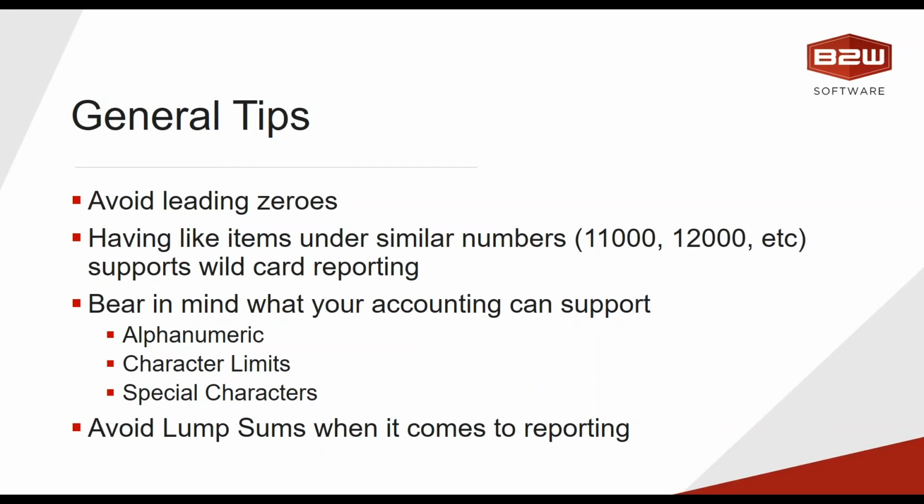When you start to assign those job cost IDs a unit of measure, it usually helps to avoid lump sums for an account level. It makes it easier for you as a company to compare how things have gone if you can have a consistent unit of measure as a point of reference. Our average cost per square foot across the past 6 months has been X, or on this job, we've been able to report Y for this.